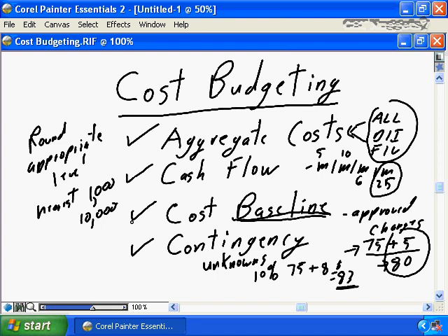If you develop a cost budget that says, my total project budget is $75,000, $321.19, no one is even going to look at the lower level numbers, and it actually gives a false impression of precision. Instead of being measured that your project delivers in the range of $75,000 or more appropriately in the range of $83,000, they're going to expect your project to deliver down to the dollars and cents. So you need to round your budget appropriately.